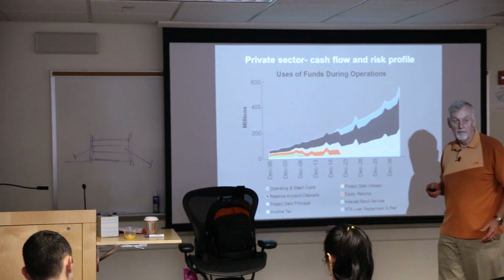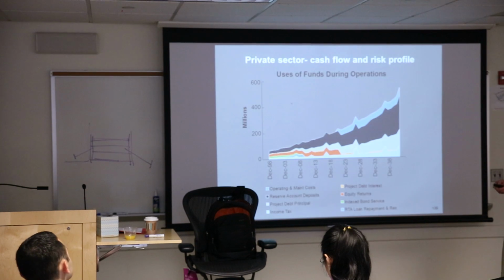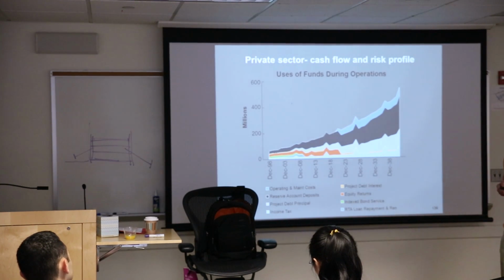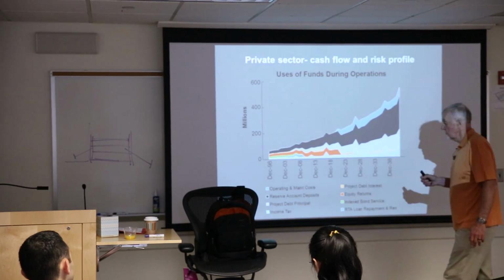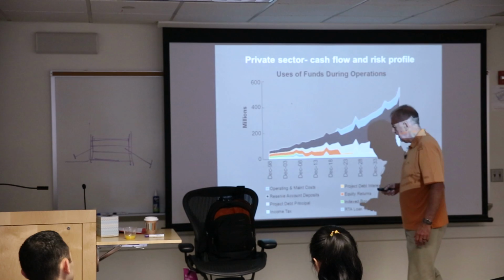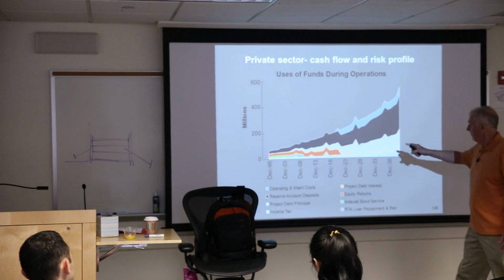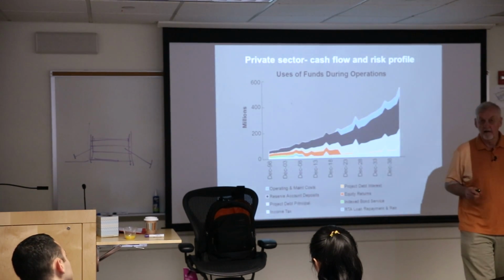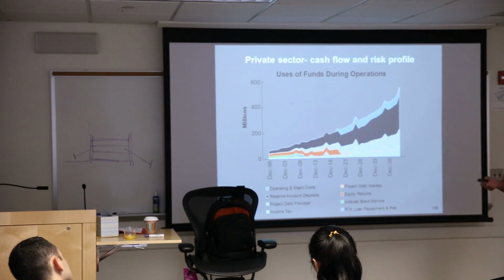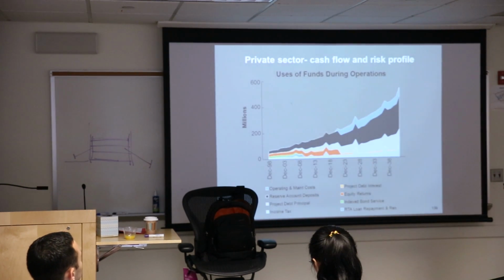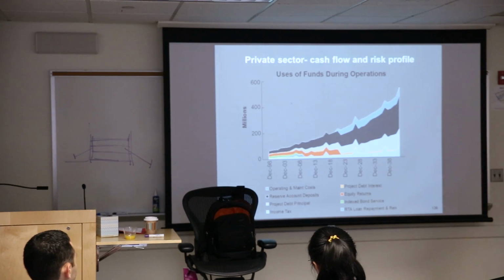I start out with this diagram because this would show you what your financial model would generate. And you can see that it's a kind of messy situation. There's bumps and some slopes change, but this would be your use of funds during operations, not during construction here. And they're cumulative. You can see that things kind of bump up at times. Fixing a building is not one where every year you spend equal amounts. In a certain year, you've got to replace HVAC, or a cooler, or a boiler, or you've got to change a roof membrane.